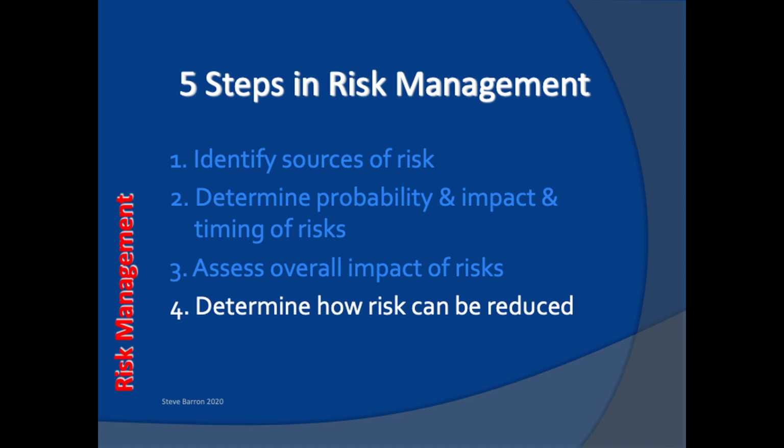Such actions are designed to deal with the risk, specifically seeking to reduce risk in terms of reducing probability of a risk occurring and the potential impact of the risk if it occurs. These actions are referred to as mitigation and will be performed whether the risk occurs or not. Contingency actions are developed to offer alternatives or a plan B that is only needed if the risk occurs.